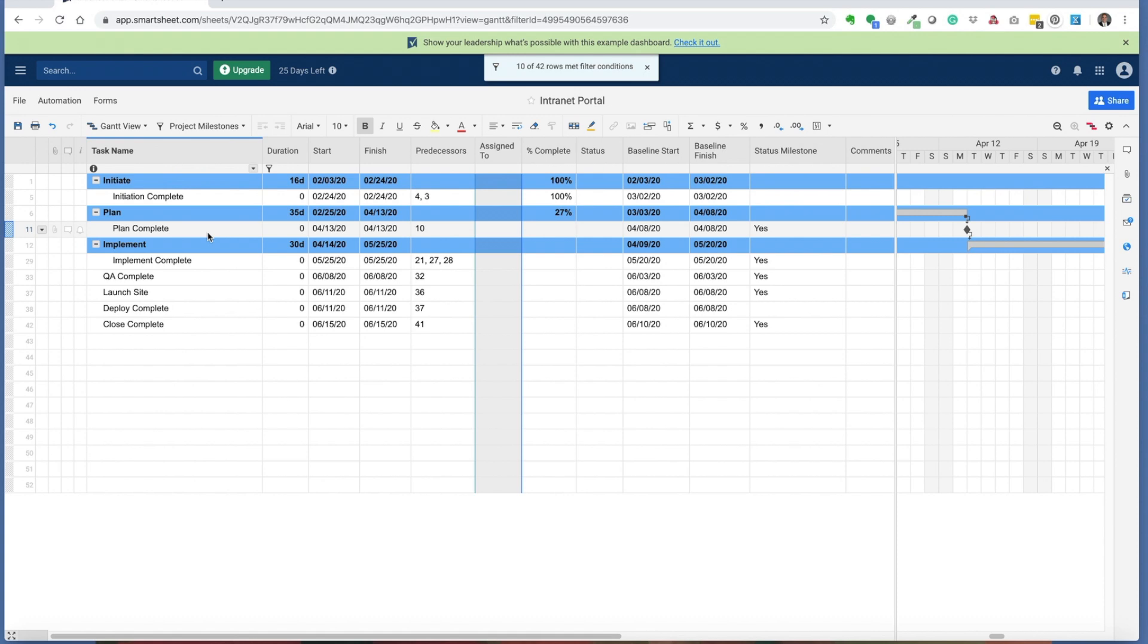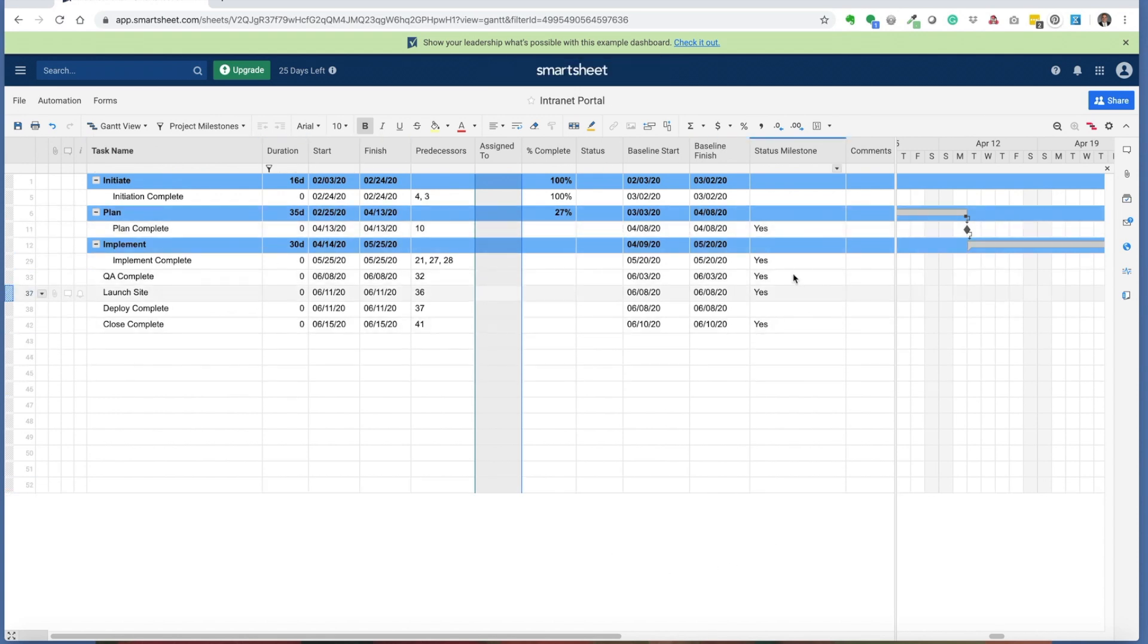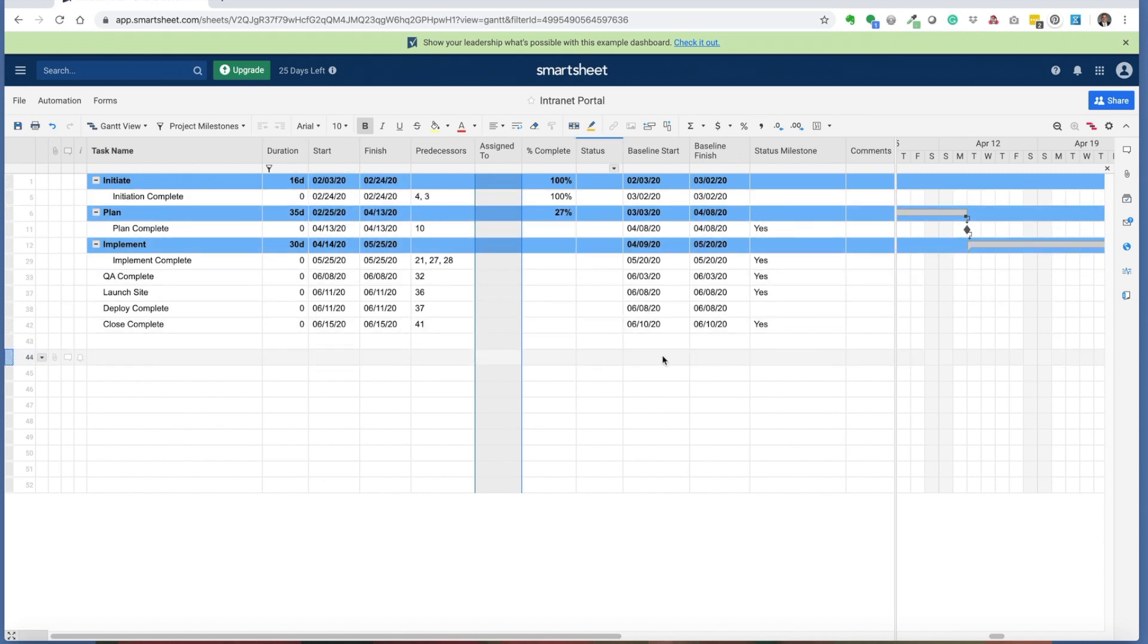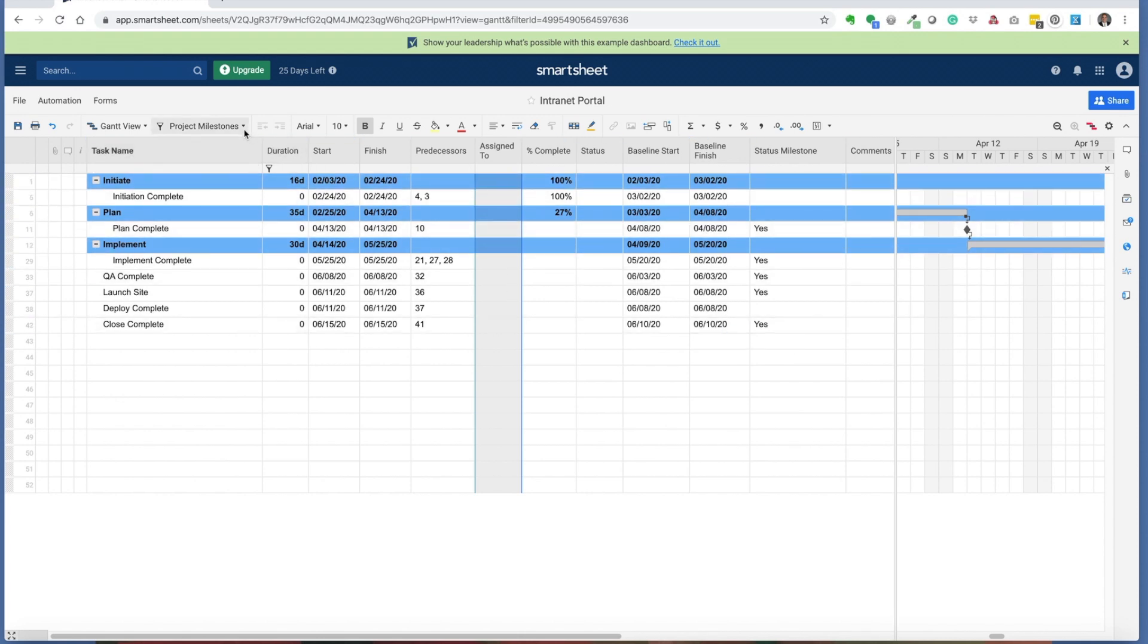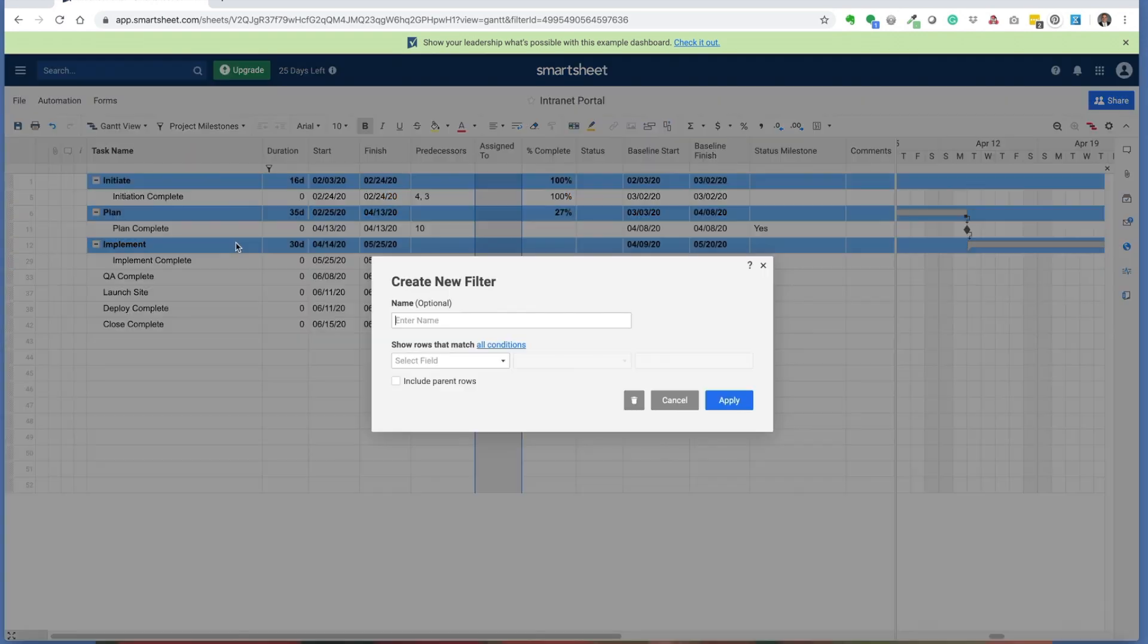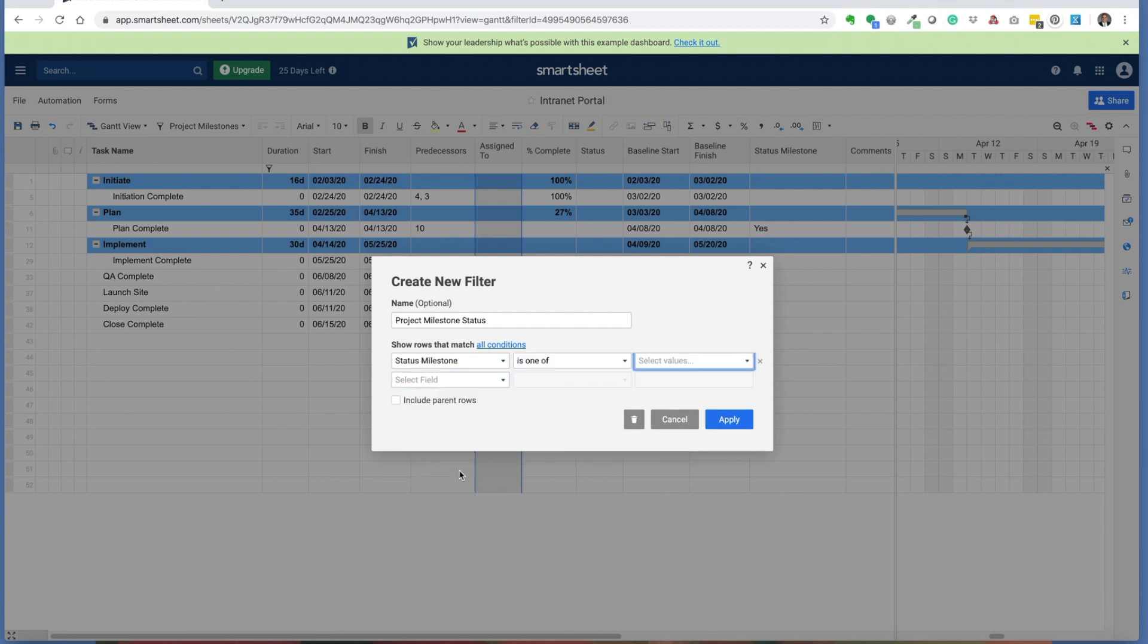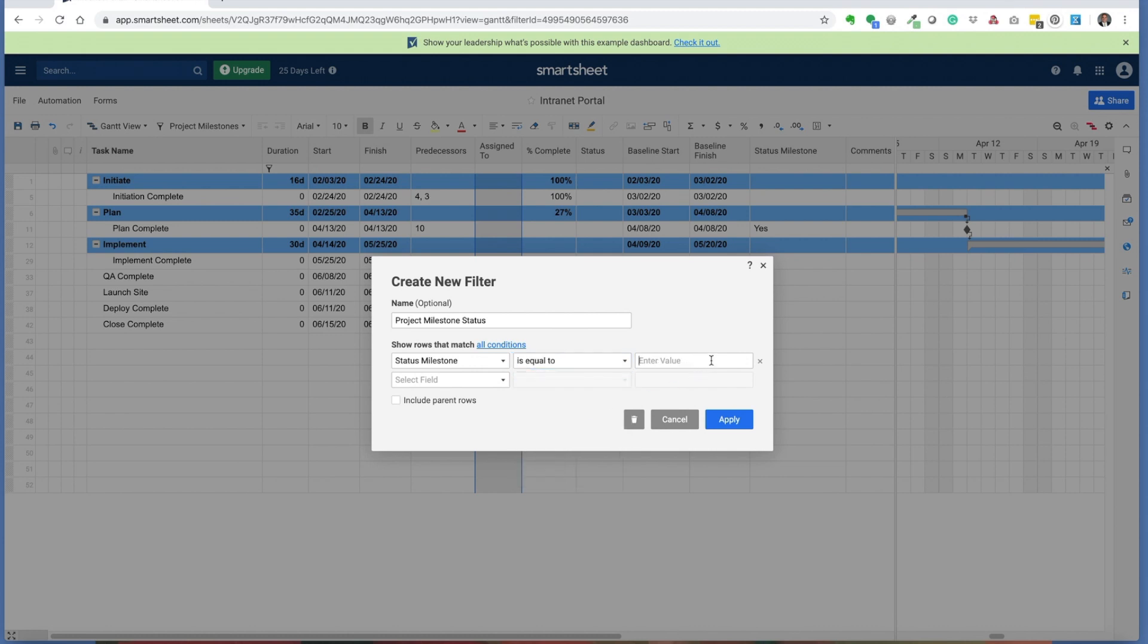I've also used another filtering technique, building a status milestone filter. Sometimes you'll have zero duration milestones in your project schedule, and you may not want to show those milestones in given status reports. But you may want to identify other tasks that are relevant for a status report. To do that, I would build a project milestone status filter. I've created a custom field called status milestone, and I'll simply indicate that it is set to yes.